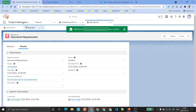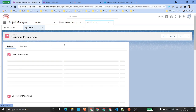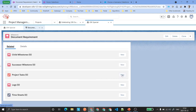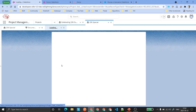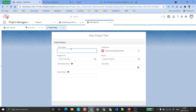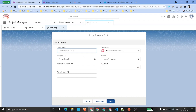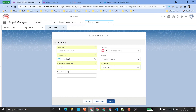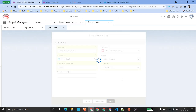Now we have the milestone under the 15k Special project. Under milestones we will have tasks. If you go here, you can see Project Tasks and Project Logs. Go ahead and create a project task — for example, 'Meet with Client'. Select the milestone, assign the user, set estimated hours to 12, and set the due date. Actual hours are the hours which will be rolled up from the project timesheet. Save it.